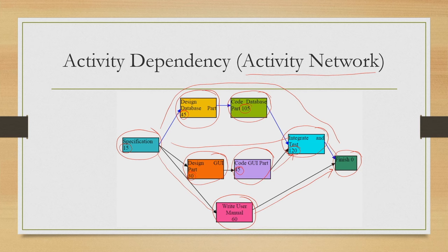So, one path indicates the design and testing of the database part, another path indicates the design and testing of the GUI part, and the third path indicates creation of the document. So, what does this network show us? It shows that we need to follow these three paths in these orders. We cannot follow the other orders, like first we create the code and then go for design. We cannot follow that. Or we cannot start with this integrate and test part before we finish these other parts,